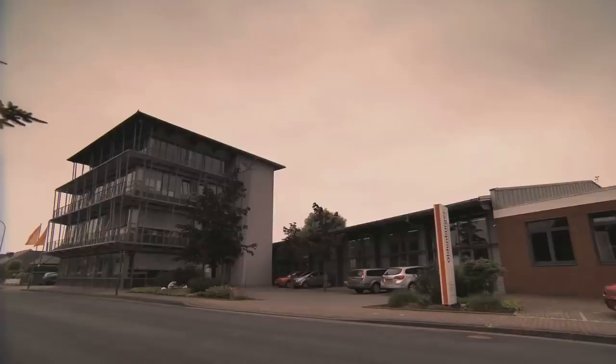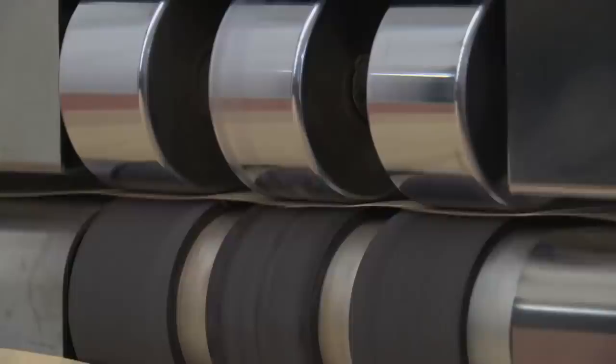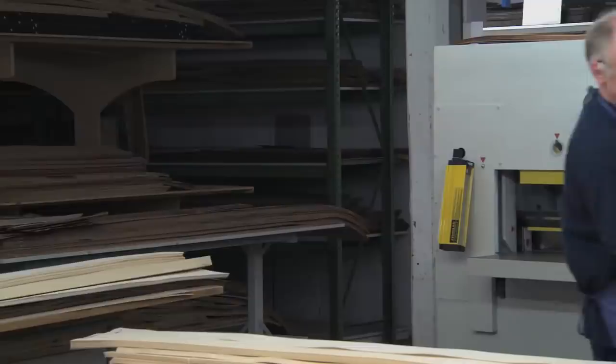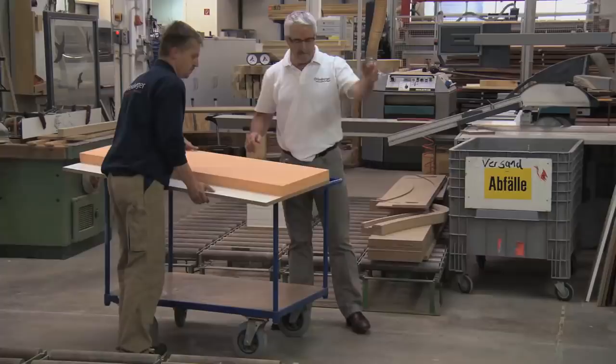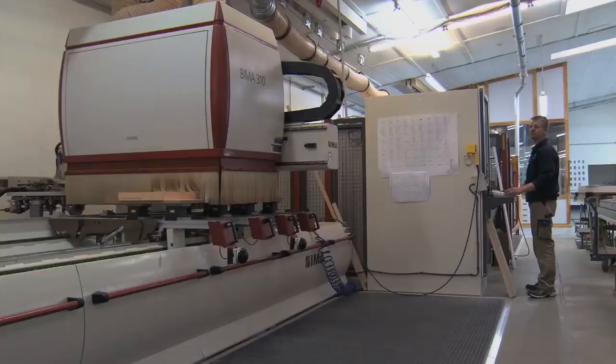In Germany, work continues on the Inouye's interior. Weight has to be kept to a minimum, but the immaculate finish requires 150 square meters of veneer. The big challenge in this project is to have a super lightweight interior according to the highest possible yacht interior standard. During the design phase, 5 people are assigned to the project. Once the materials have been sourced and production begins, this rises to 20 people. Work then lasts for 2 years.